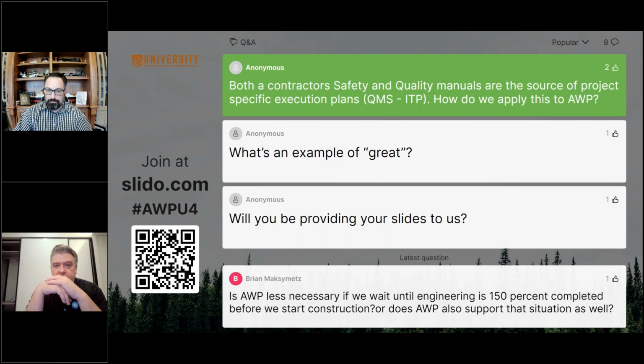We're having equipment in an area broken down into, hold on, I'm going to do the receiving and preservation, then I'm going to do the setting and hooking it up, getting it ready to hook in the pipe. Now I've got my pipe hooked in. I got to come back later and do the inspections on it. And you got to phase CWPs around specific, not a CWP per inspection on a major piece of equipment. You may have more than one CWP for inspection, so right sizing it for the equipment, but you get the CWPs lined up with your quality plans and your commissioning.